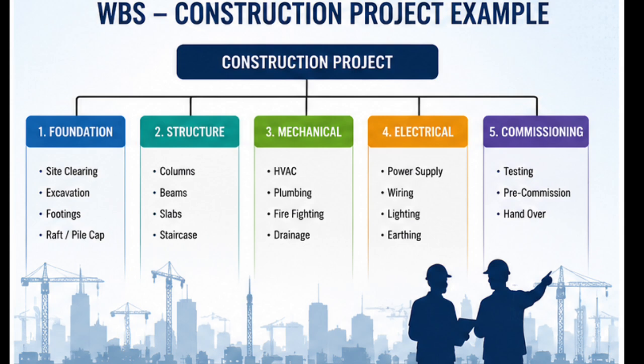Then the next part will be your delivery. Once these items are ready and tested, you need to dispatch these materials to your site location. That could be by sea transportation or road transportation, and you can plan based on the distance. If you're going for sea transportation, you need to plan it well in advance, because the vessel has to be booked, and then you could load a lot of items on it. That will also come under dispatch, or store and deliver.